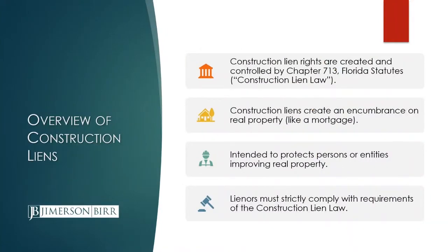So first, I want to give a high-level overview of construction liens. This is probably things that everyone knows, but let's just cover it quickly. Construction lien rights are created and controlled by statute, and they're found in Chapter 713, Florida Statutes, which is generally referred to as Florida's construction lien law. You might hear references to mechanics lien law, and that also refers to the construction lien law. Construction liens are essentially like a mortgage. They create an encumbrance on the real property when the lien is filed and recorded in the public records.